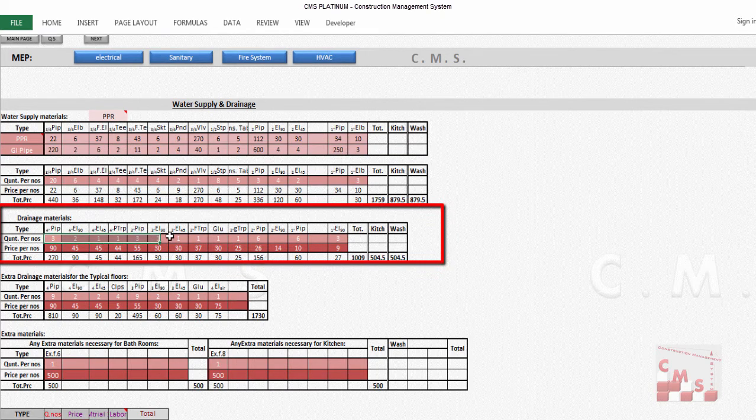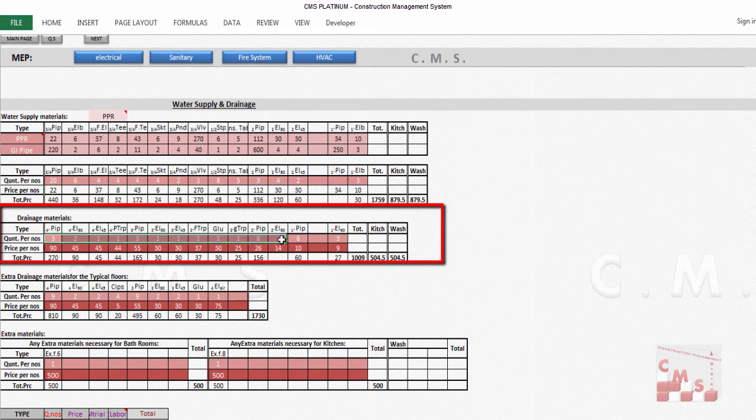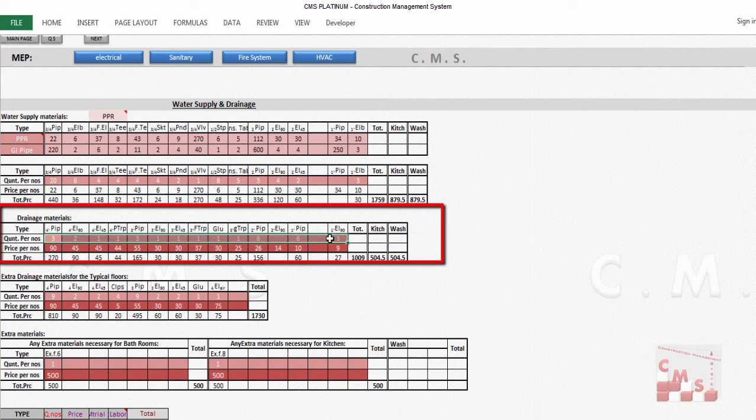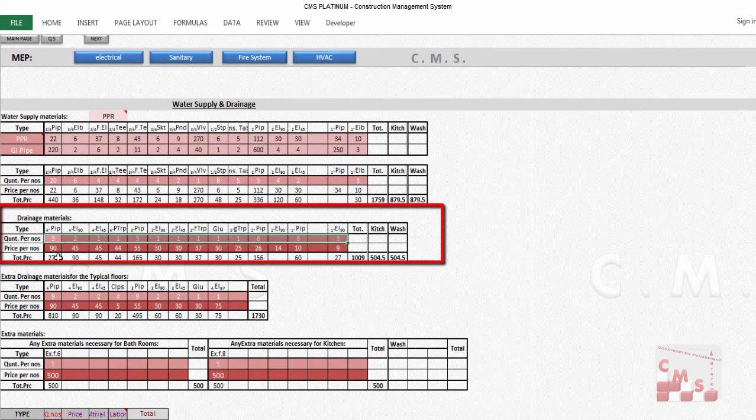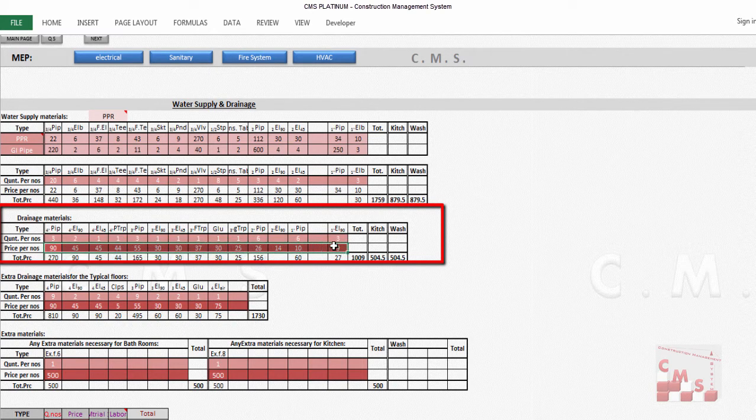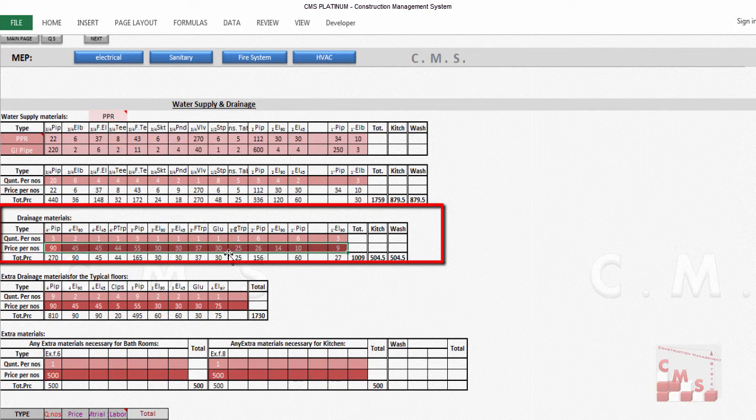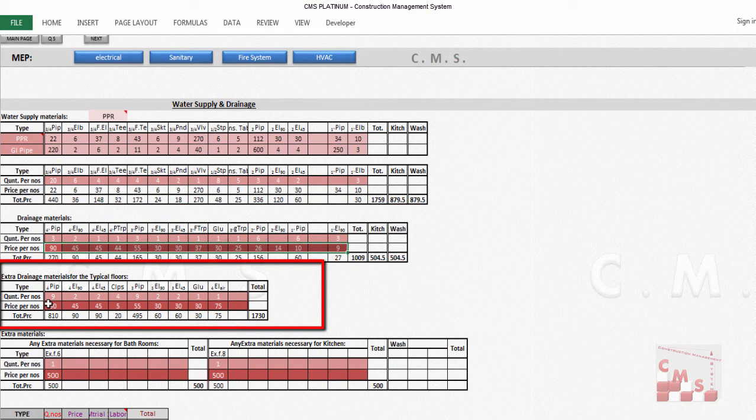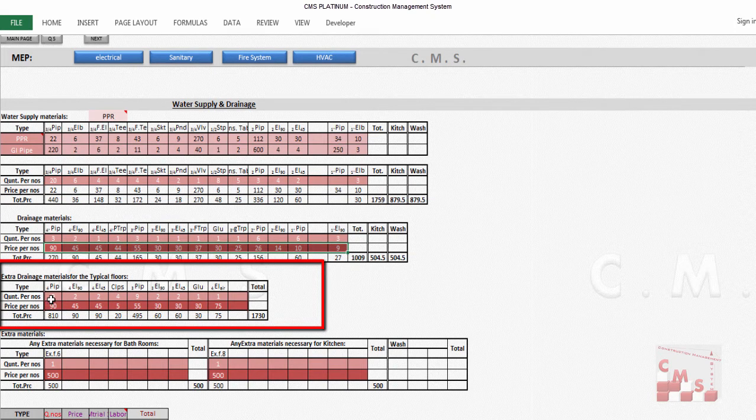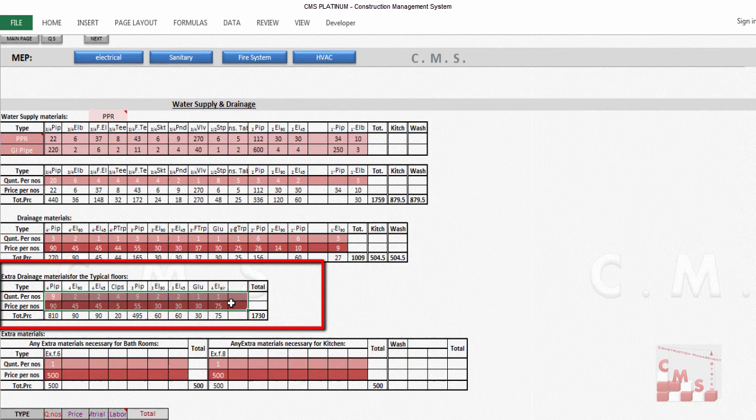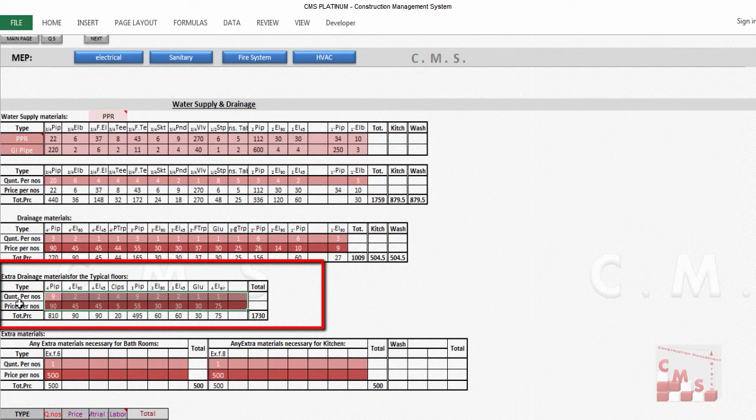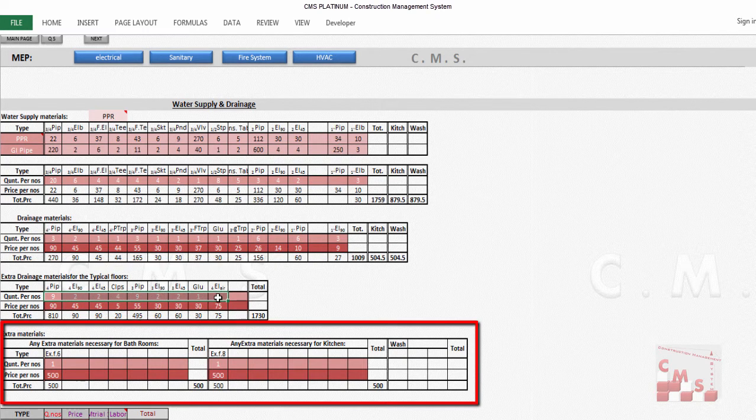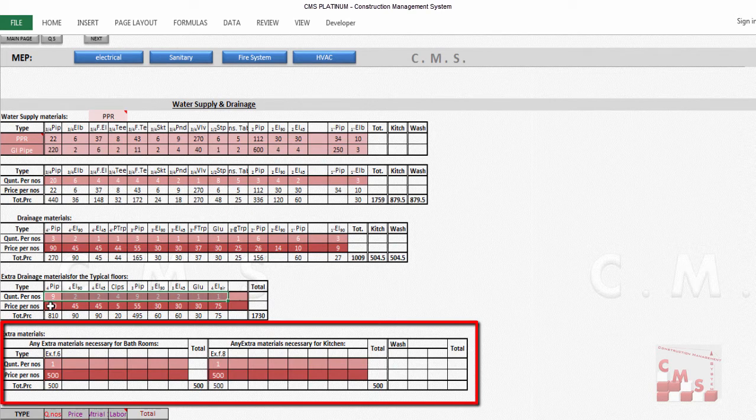The same for drainage: here are also the common quantities for each bathroom. That's the price for the same pipes and accessories for drainage. If you have extra drainage for typical floors, it can be added here. If you need to change the numbers for typical bathrooms, because when you're going for high risers you have to add more materials, you can adjust accordingly.